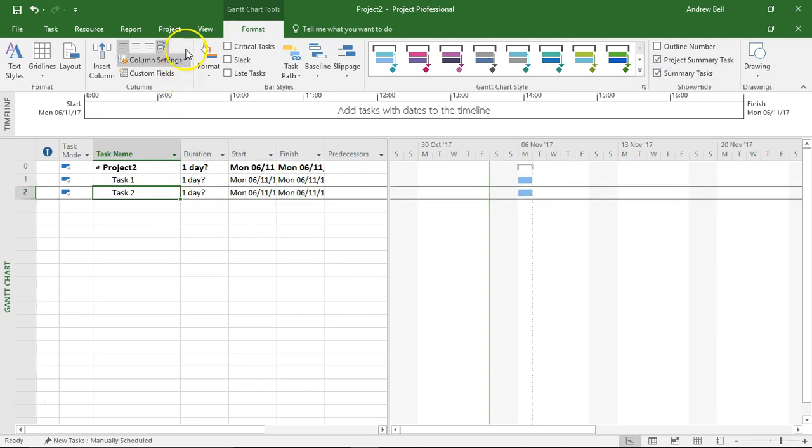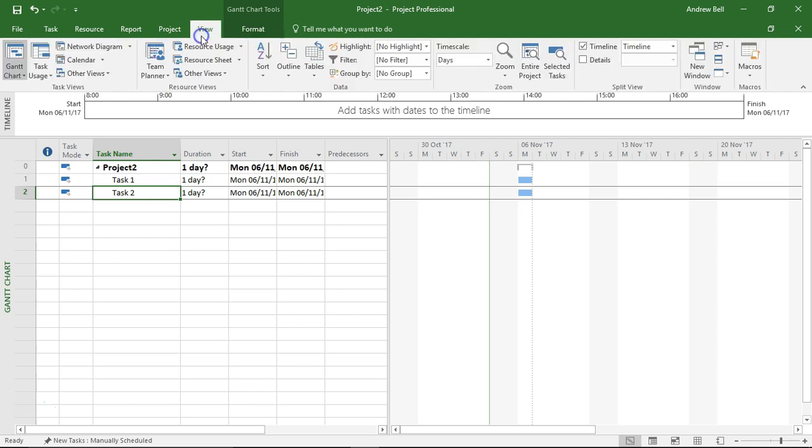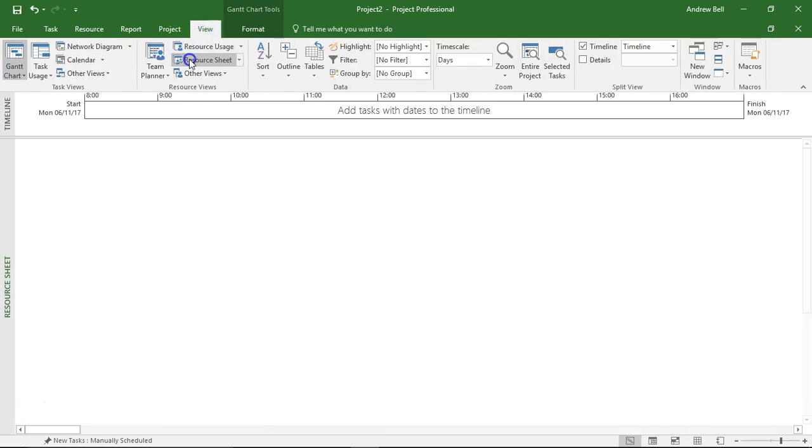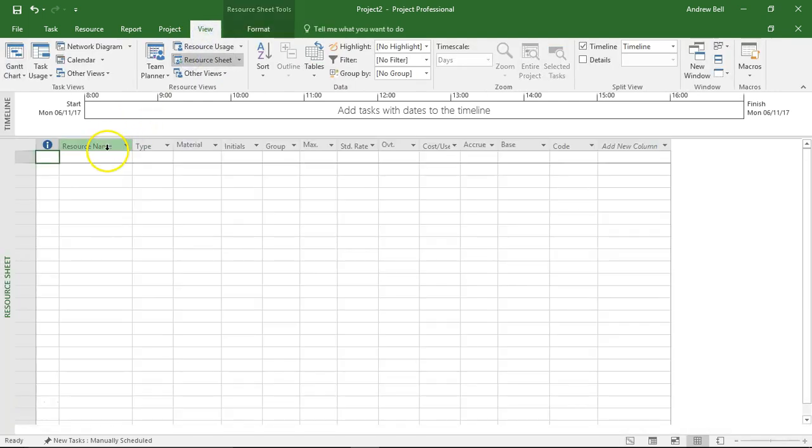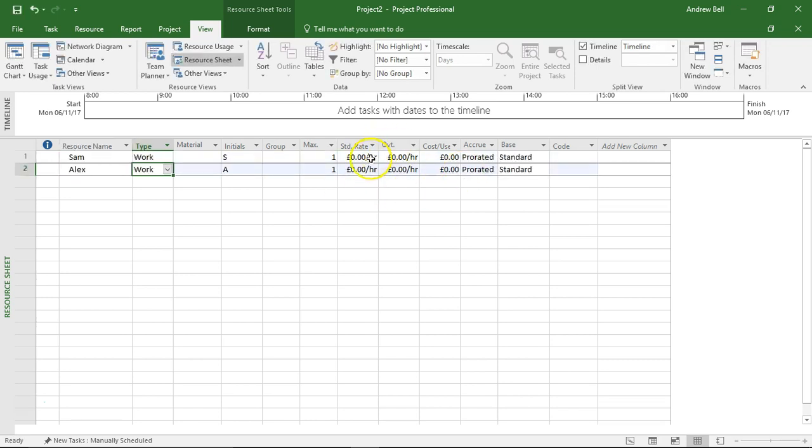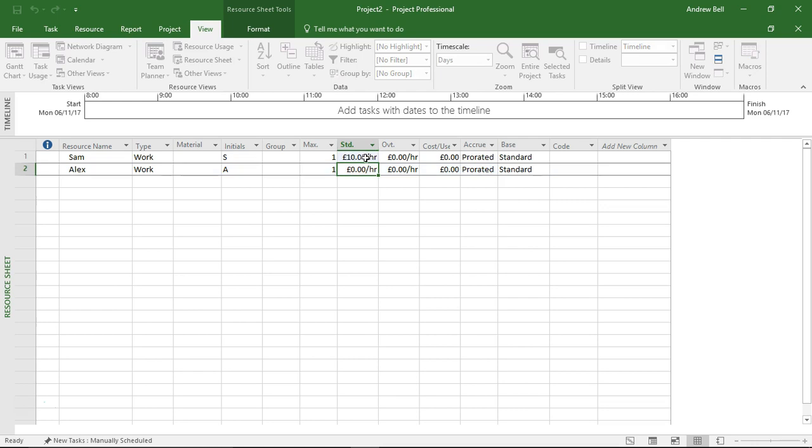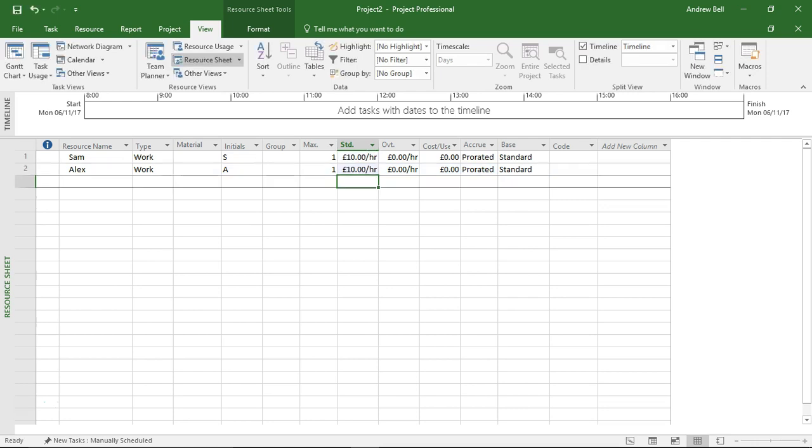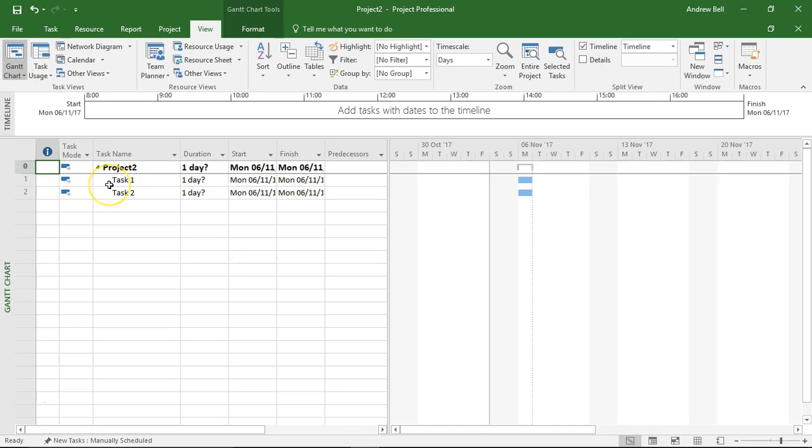I'm now going to go to the resource sheets and add in two resources: resource Sam and resource Alex, and I'm going to give them £10 an hour as a standard pay rate. Now back to the Gantt chart.